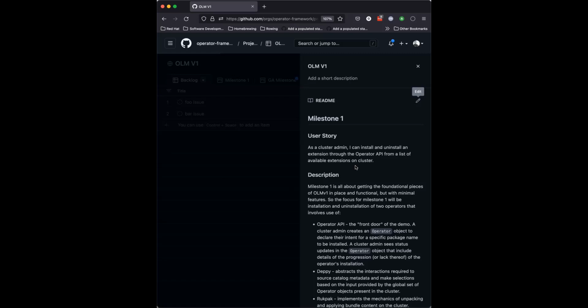I think the ORIA operator stuff is not that yet, right? We somehow need to make something visible to an operator author to put in their bundle, and we somehow need to give the cluster admin a way of tweaking that. I don't think we have any of that. And if we think that milestone 2 is adding that in, then let's go write milestone 2 for what we think we want it to do, and then we can start designing what we're actually going to do. Maybe we do some of the design for the next milestone while we're working on the previous one.